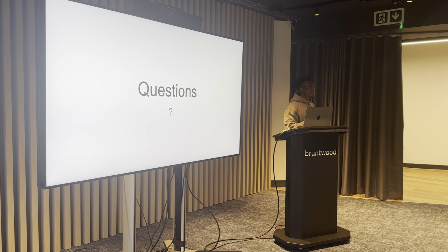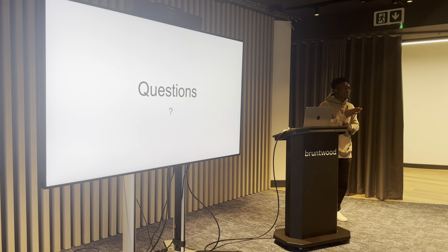It's always the engineer who writes it down, but it's a collaboration, right? A collaboration between the product person, the designer, and the engineer, the pair amigos, as we all know it, could be more than that, right? They all come together. That's why it's a collaborative tool. So we don't have any situation where a feature was built and the product manager doesn't even know what it's doing, because we all sat down to draft our BDD. And the BDD has to pass before you can say you have reached your definition of done.